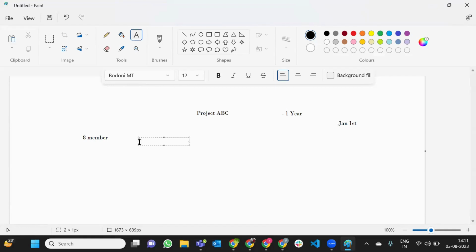what are the steps? After requirements are done, they will design. After that, they will develop. Next, they will test. Then they will deploy, and they will maintain. They start gathering the requirements on January 1st. By July 31st, for example, they have finished the development, and they have taken 1 more month to test it. And at last, on December 31st, they have delivered the product to the client.